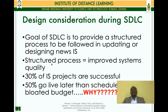Scope creep has to do with when the system's boundaries and depth are increased beyond what was originally planned. When that happens, it takes a lot of time and comes with new budgets. In physical development project arenas, we usually refer to that as variations. Once the system boundary changes, contractors will bring new variations that end up bloating the budget that was earlier estimated.